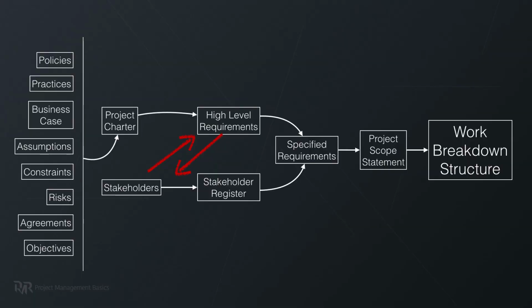Some of the requirements are related to the final product you need to deliver. Some of them are requirements to the processes and tools you need to use. In other words, requirements to your project management approach. Other stakeholders, like the CEO of your company, will require you to communicate with clients in a certain way. Here's the main takeaway for you. If you miss identifying key stakeholders, you will miss identifying key requirements. However, sooner or later these requirements will appear. It will be the scope of work or risks that you didn't anticipate.